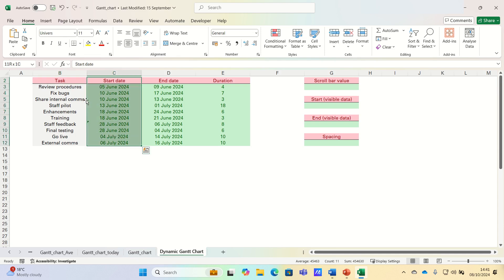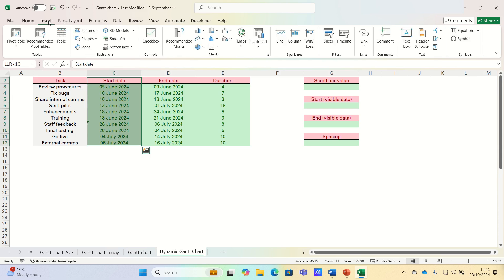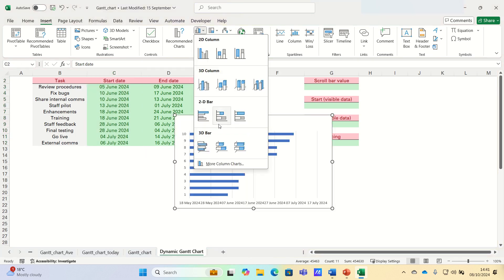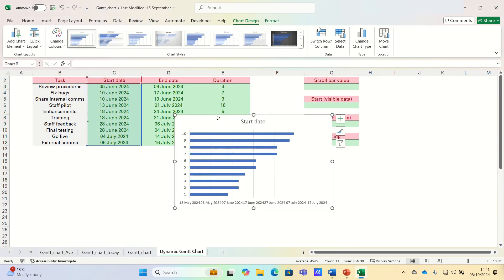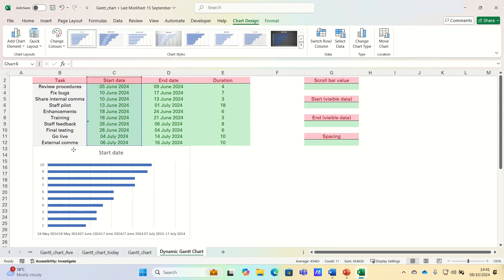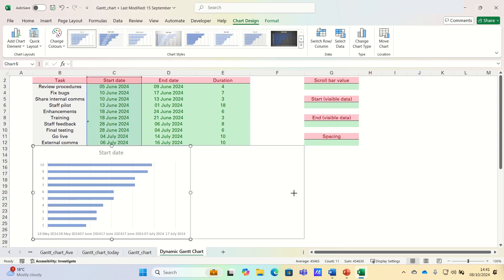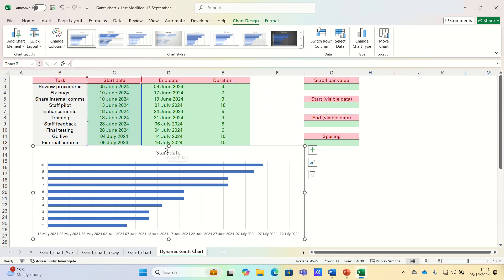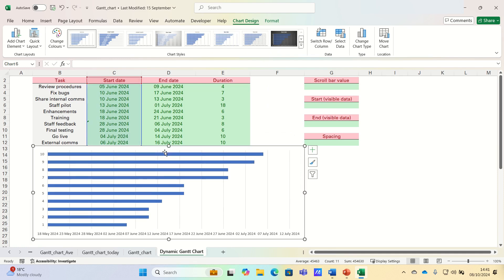Firstly, select the start date, go into the insert tab and then select a stacked bar chart. Next, let's remove the chart title and we'll add the duration data.